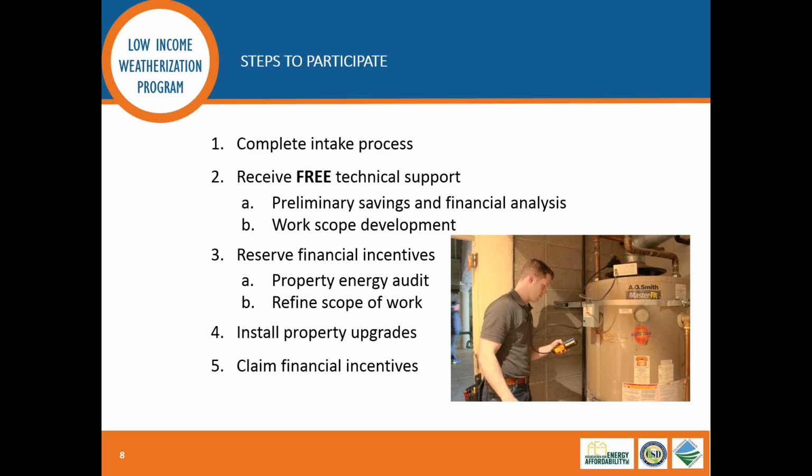And what the incentive amounts would be, and then follow up with the building owner and say, is this something you're willing and able to do? If the answer is yes, then we proceed to the good faith deposit. There's a form that the owner would sign, called the intent to proceed form, which means just that. And with that, they would submit their good faith deposit. That would greenlight AEA to go out and do the full energy audit at the property, refine all those numbers that we did from the desktop analysis.